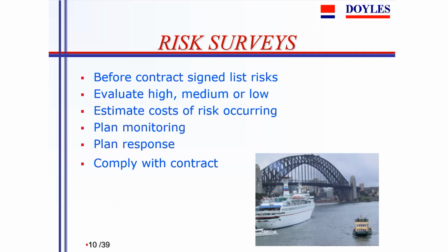Is it likely that there will be some hard rock? Is it likely that there will be some dilapidation on adjoining sites? And then estimate the costs of those occurring. So one has a bit of a perspective on where this contract is taking one, what sort of risks are going to be incurred.